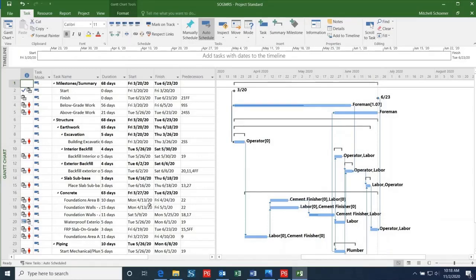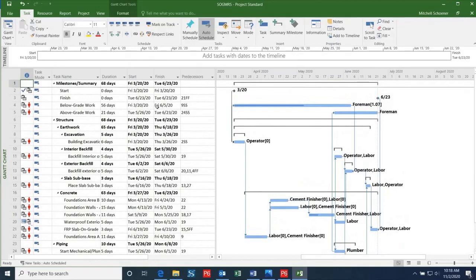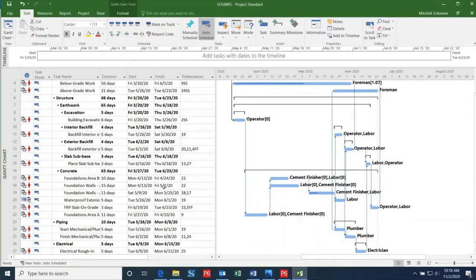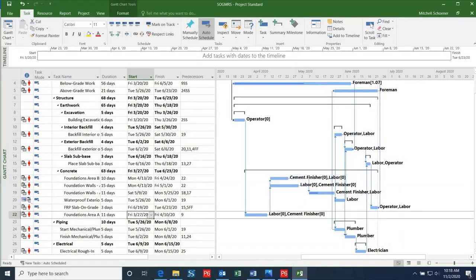Although our project still shows the same start and finish dates, there are some discrepancies in activity start and finish dates due to the fact that we are using a six-day work week for three of the tasks in this project.